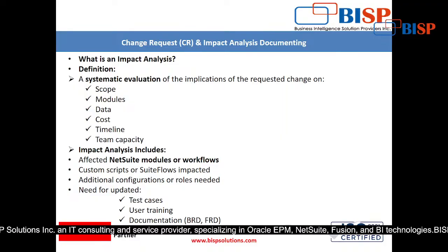For example, I have prepared a workflow on purchase order, an approval workflow. Suppose I have written that if it is less than 10,000, then no approval is needed, and in the middle of the project the stakeholder asks me to make changes. If it is below 5,000, in that case only no approval needed. That means a change in the range of the amount. So definitely I have to open that particular workflow and change the condition in that.